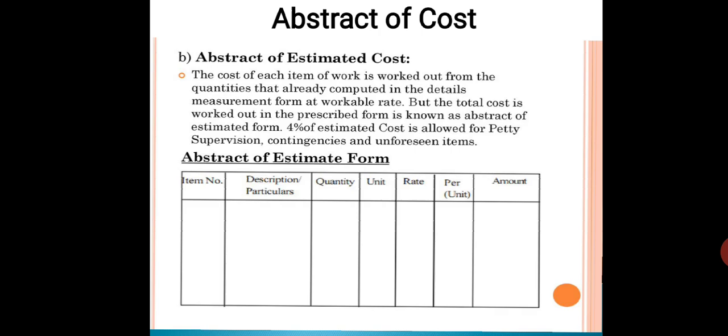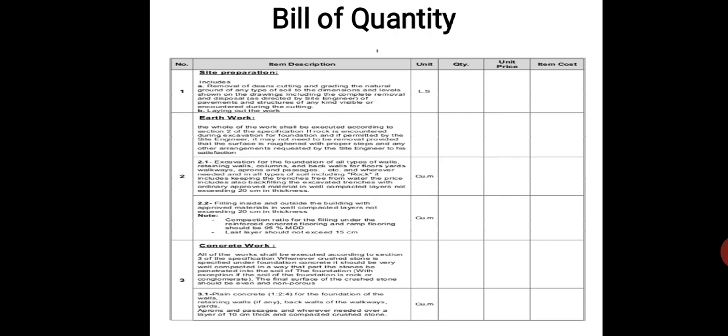The bill of quantity form contains item description, unit, quantity, price, and item cost. For example, site preparation work includes removal of trees, coatings, and grading of natural ground of any type of soil, leveling and disposal as directed by the site engineer, including removal of pavement and structures of any kind encountered during cutting.